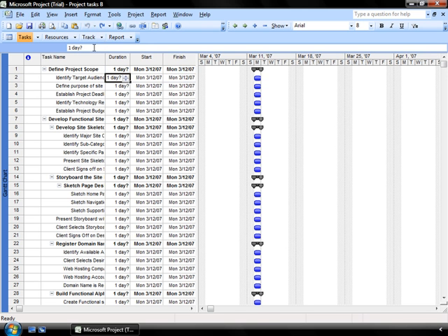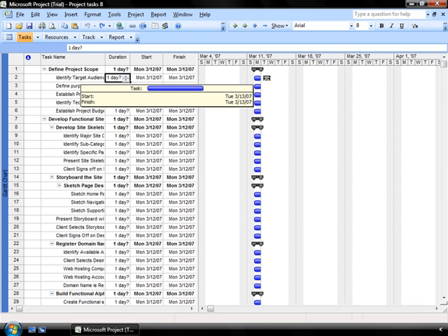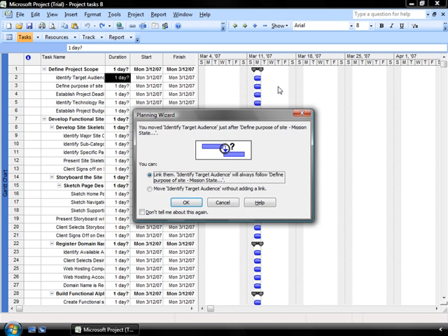The final way that I can use to increase the duration of a particular type of task for those that are more visually oriented is to use the Gantt chart lines itself. Now you'll notice as I've moused over this particular Gantt chart, I have a 4-sided arrow as my mouse indicator. I simply click and drag that indicator along the line to then increase or decrease the amount of time that's spent on that particular task.